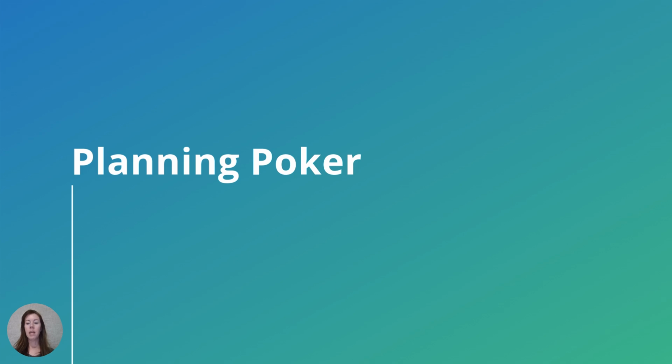Planning poker. Planning poker is a consensus-based agile estimation technique that measures team expertise to estimate effort. It ensures accurate but not overly precise estimates by having discussions and a shared understanding of tasks before making assignments. Teams typically use the Fibonacci or modified number scales, which are presented on cards and estimate effort in ideal hours, days, or story points. The process follows structured steps.